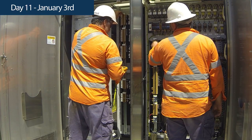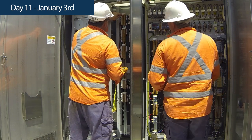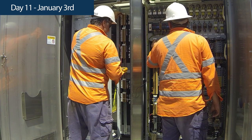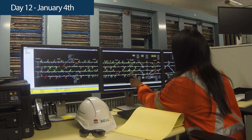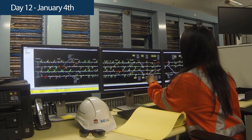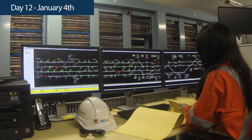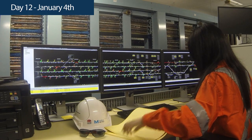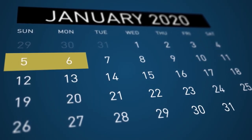The signalling team will continue with field correspondence and set to work tracks, points and signals to allow field certifications and readiness for the design integrity testing of the Illawarra locals and Bankstown Line. Design integrity testing will commence at the interface areas, Meeks Road, St Peters, Woolly Creek and Merrickville, where the newly installed signalling system connects with the existing signalling system. The final 2 days of the possession are for the completion of aspect testing.